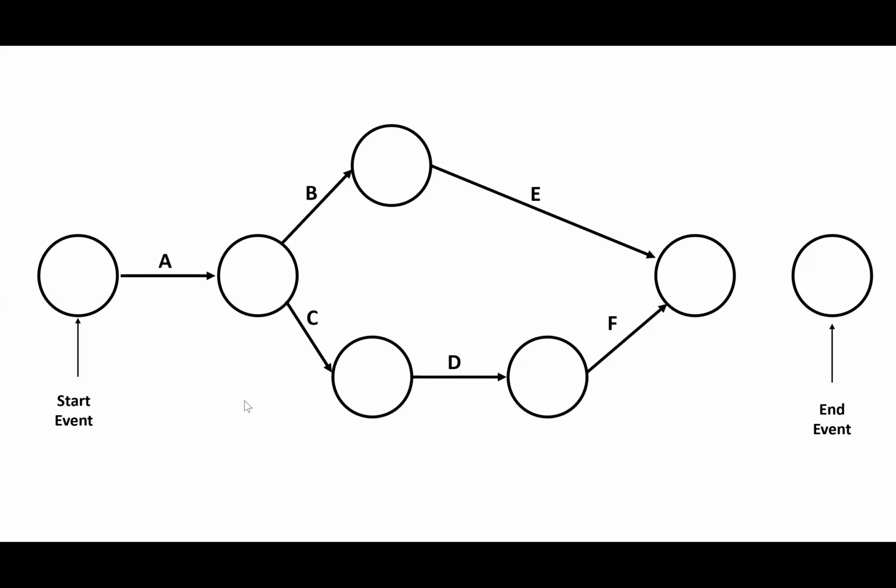Same preceding activity. Perfect. Kokasi says in the chat, E and F have the same succeeding activity. They are the preceding activities of G, because we can never start on G until E and F are done.